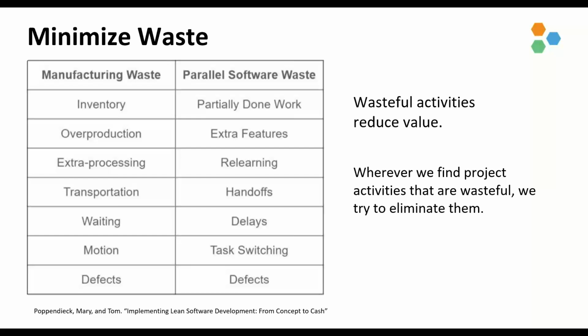Right? These are handoffs that are considered wasteful activities. Delays. These are time intervals in which one or more team members are idle, waiting for input from another activity. For example, waiting for staffing in a project, long approval processes, lengthy feedback loops, requirements gathering, those kinds of things.